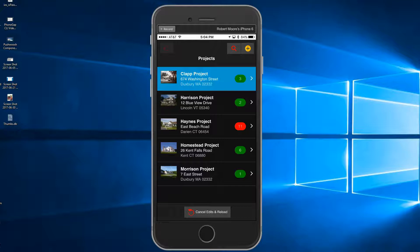Many contracts will include a reference to the punch list, and typically a percentage of money, normally between 2 and 10 percent of the total contract cost, is retained until the punch list is completed.